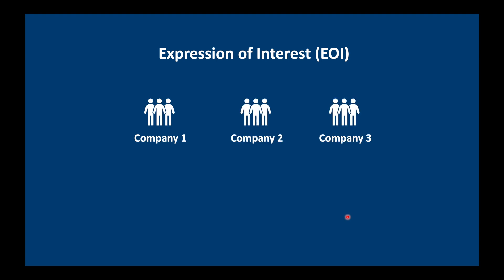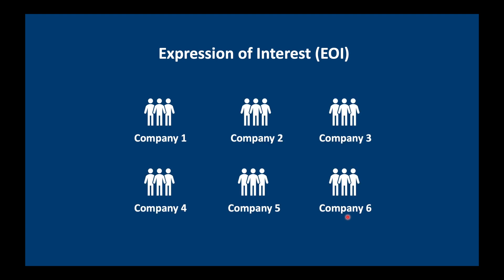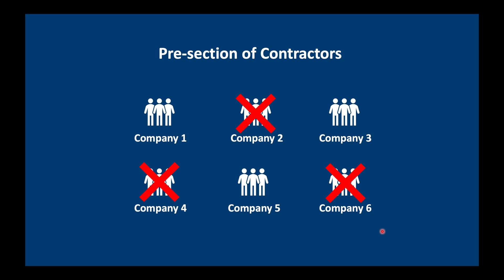The first thing we do is launch what's called an expression of interest. We ask who would like to drill our water well, and we're going to get a lot of responses from different contractors all saying they'd like to bid for this project. If we have too many contractors expressing an interest, we need to eliminate a few of them — otherwise we'll end up with a lot of unnecessary paperwork.